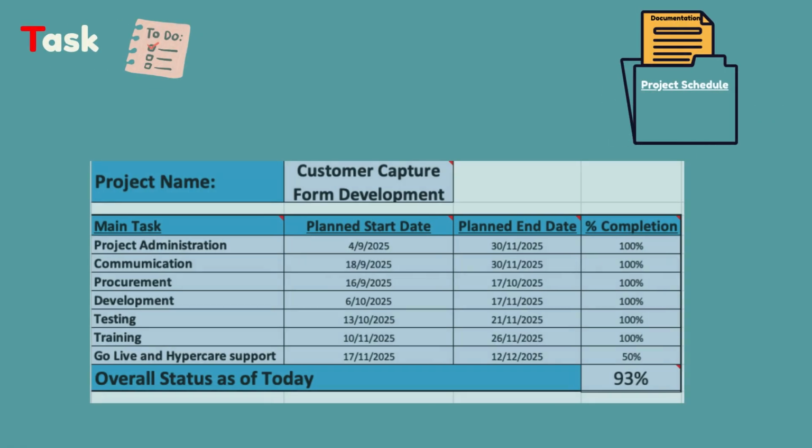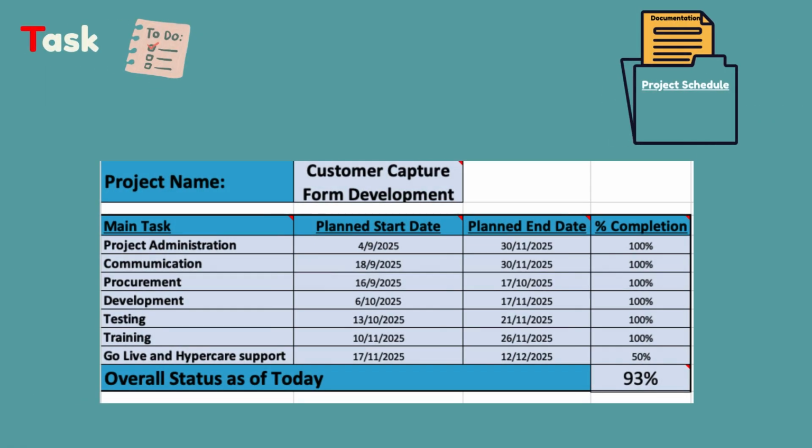After all these, you might have questioned how you should present the project schedule to other people in your team. Will it be too much to share the whole project schedule with them? Yes, if you are talking about the project sponsor, stakeholders, or higher management, they don't want to know so many details. Therefore, instead of sharing the whole project schedule, you should prepare a milestones chart to serve the purpose.